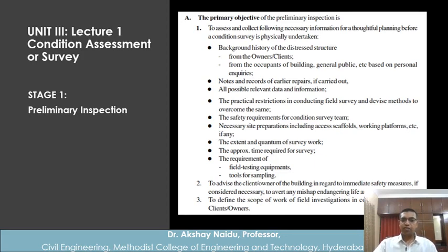Then the safety requirements for the condition survey team. Meaning depends on where the damage is located, how they have to do the tests. So for that, safety requirements is essential. Necessary site preparations including access scaffolds, working platforms, etc. if any, the extent and quantum of survey work, the approximate time required for survey, the requirements of field testing equipments, tools for sampling, so on.